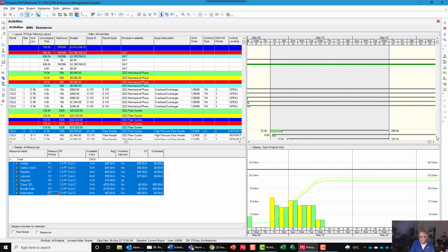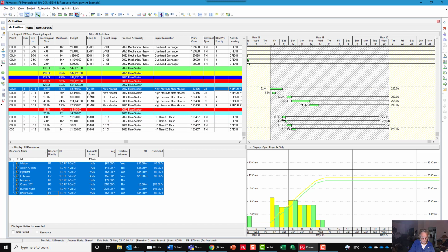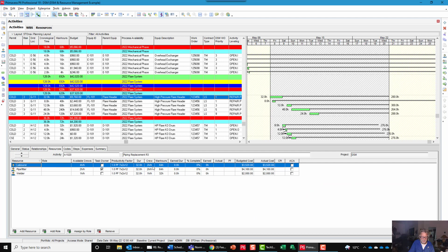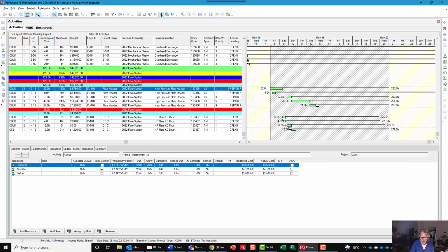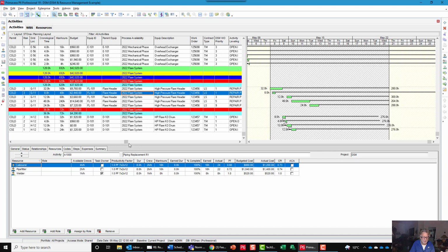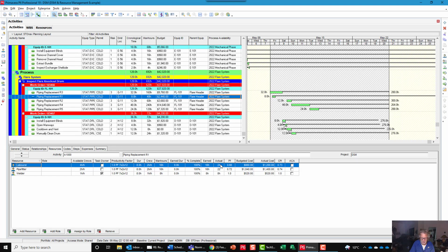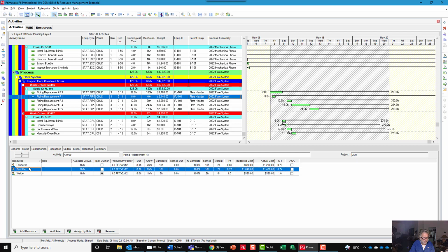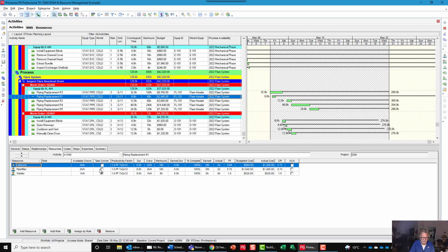So that's just a bit of a tip for you, just to understand the difference when I'm looking at the PF. Remember, PF is the productivity factor applied to a benchmark estimate to make sure that I can make up for non-productive time of walking time, permit time, safety meetings, all the other complexities that are assigned to it. And at the same time, I want to be able to calculate my PF, which here is tool time efficiency. So again, you'll see here that this job is completed by the movie stars, welder, pipe fitter, and the indirect support crew of a laborer.